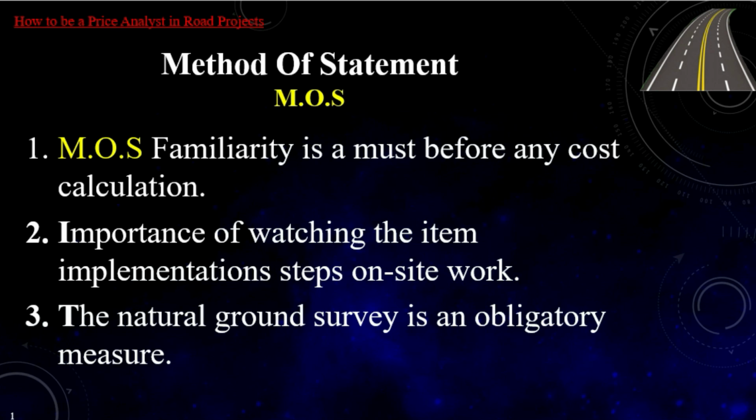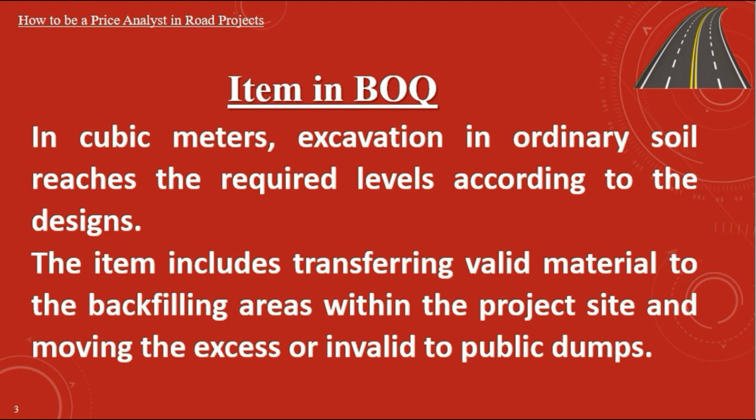We say it here, because it will not be mentioned anymore in the method of statement explanation for any other upcoming items. Because natural ground surveying is an obligatory measure before landing any equipment or machine to site work. Here is our first item.